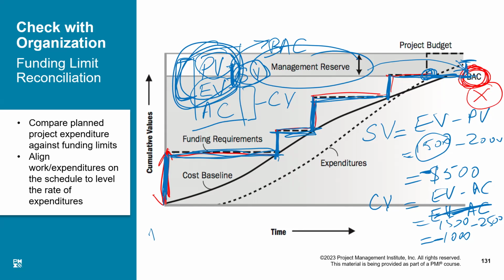If earned value is equal to planned value, that means my SV is 0. That means I am back on track. I am not deviating. I am now okay. The problem I had in the first cycle, I have corrected by putting in extra effort, and now I am not behind the schedule.